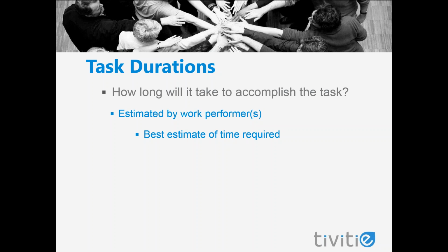I've worked in a lot of organizations where because they're given the end date first, they end up doing their estimating to fit within the due date. That's not where you want to start. That may be where you have to end up, but initially you want to know what it truly looks like based on everyone's best estimates and best information at this point. And then you can figure out, if necessary, how to bring in the end date.